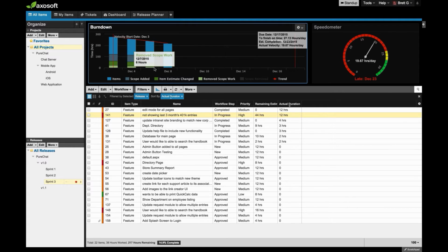And now your Scrum Master can see, oh wow, I've got this extra green block here, which is an extra 40 hours, which I hadn't budgeted for. It wasn't on the plan, because I couldn't foresee these things when we were planning. But now I'm immediately giving that information to my team and to my manager that there's an extra 40 hours, we need to find it from somewhere.